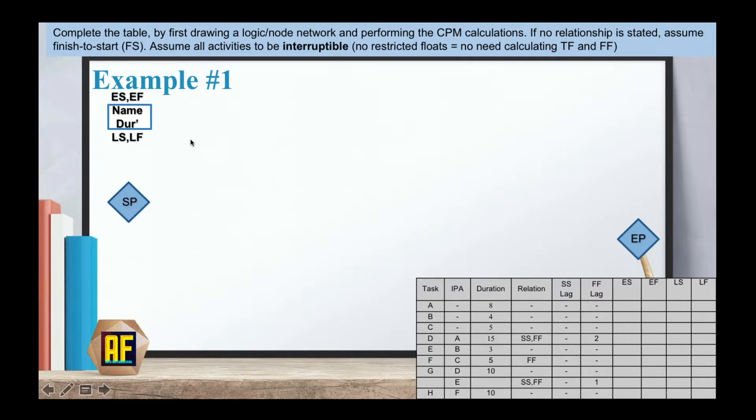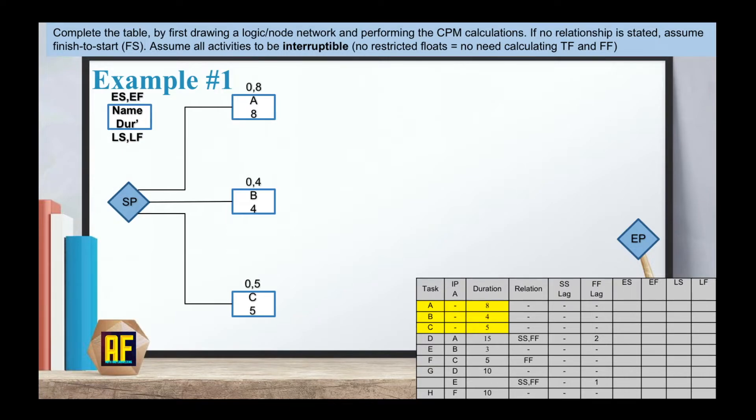If you remember our box from the previous video, this time we will be working with a smaller box because we don't need the total floats. We have our early start, early finish, late start, late finish, name of an activity and the duration. We need to do a starting point and an ending point which all activities should finish at or start from. Activities A, B and C have durations of 8, 4 and 5. These are our first activities so they all connect to our starting point. Zero plus 8 equals 8, zero plus 4 equals 4, and zero plus 5 equals 5.